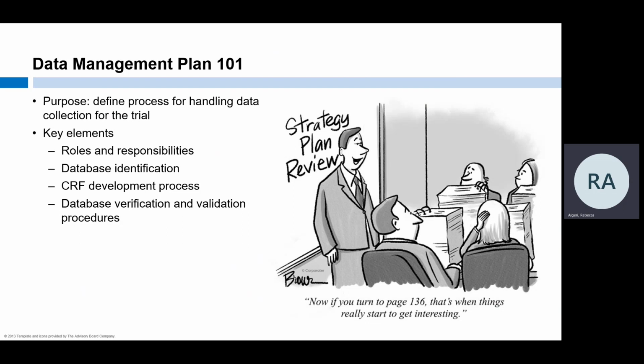Our comic pokes fun at how lengthy written plans can be, and it wouldn't be funny without being sort of true. Accounting for these various aspects of our study does require an enormous amount of detail. Our data management plan needs to define the roles and responsibilities required to execute the plan. Who is responsible for drafting the case report forms and ultimately building them into a functional database? Who is responsible for entering data or managing queries? Who's going to run reports from the database for monitoring, data safety reviews, or statistical analysis?